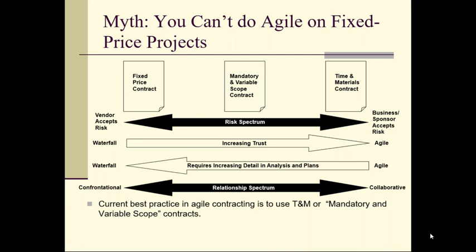And we don't know how many interior walls, where they are, how many washrooms we're going to need specifically. Things like that may move around a little bit. The specific lighting requirements and electrical requirements may change. So there are variable items, along with these mandatory fixed items, like the structure of the building and closing it in, which is probably fixed, but some of the interior fit out stuff would be variable. So we would have the mandatory phase to get the shell completed, and then we'd have this variable phase for fitting out the various floors.